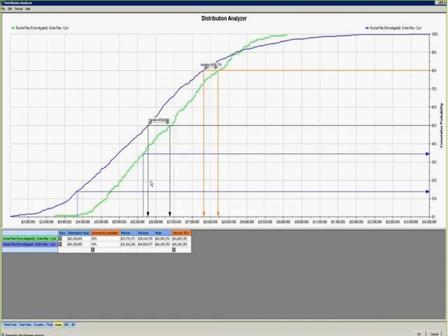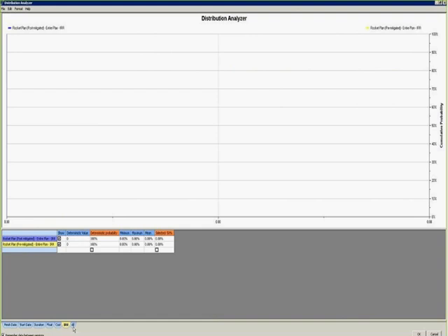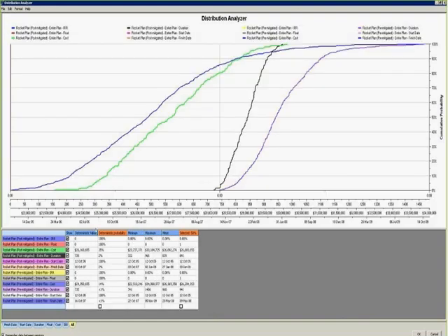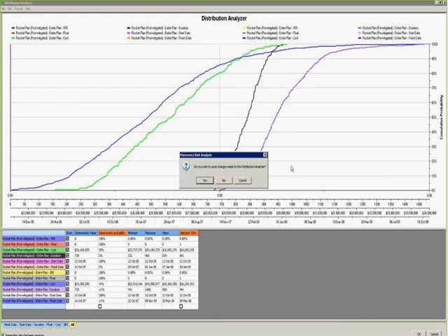Cost. Look at that. Your post-mitigated plan could probably cost you a little quicker, faster, but it tops out at a lower cost. So having done this, even if everything went wrong, you'd still save $3.5 million or 10%. And probably you do a little better than that at any point in the project. Last but not least, the internal rate of return didn't work, and then you can get a consolidated view of all your numbers.